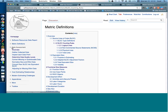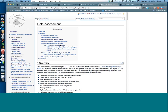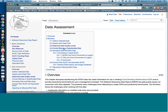Next is data assessment — really preparing data for analysis. Creating the little estimating equations goes pretty quickly; the hard part is deciding scope and processing the data to make it homogeneous. That's really where the lion's share of the work is. The workflow involves: gathering data, inspecting each data point, determining data quality level, correcting missing or questionable data, normalizing size and effort, converting raw SLOC to equivalent SLOC using our formula, and then adjusting for missing effort data.